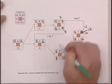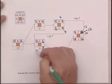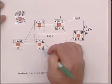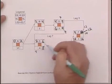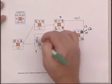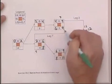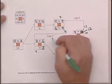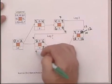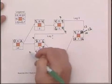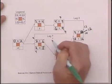We take eight to here. And then here we've got to not only take into account that the late finish for activity C is eight and four minus eight is four. But also we have this start to finish lag and that influences this late start. So we take that nine, subtract it from seven, which means two. So we have two choices for the late start. When we go backwards, we always choose the smaller number. So that becomes two.